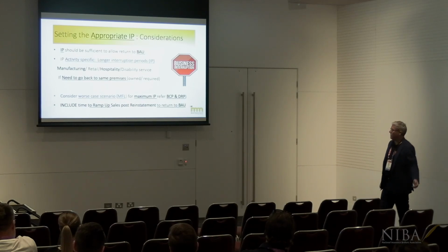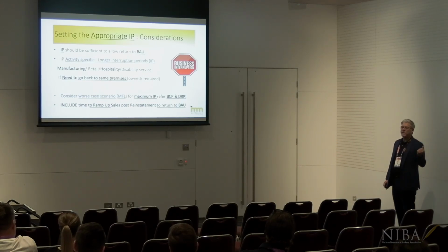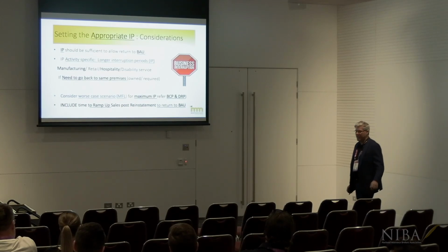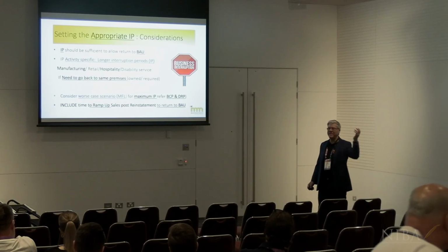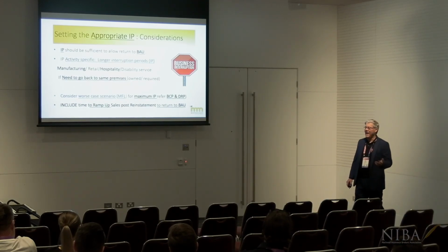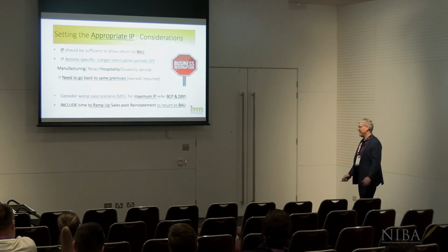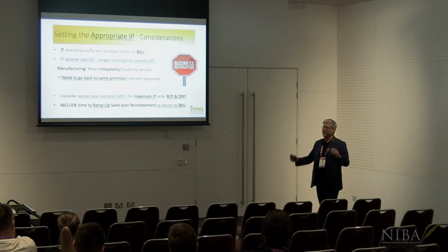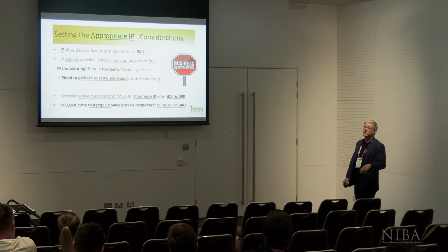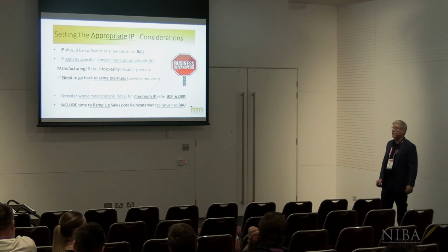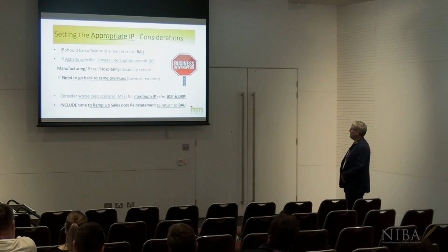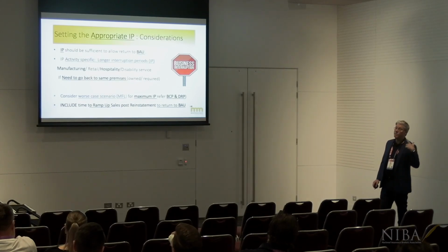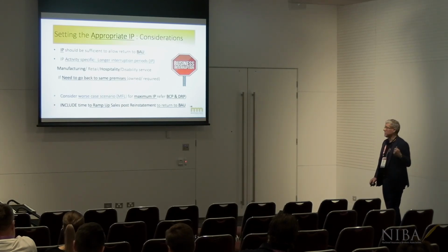And basically what we've found is post-COVID, everything takes longer. So we have examples. We do work for Lion breweries and wineries. And so we actually did the flood claim in 2011 and then the flood claim again in 2022. So you get a real exact comparative of how long it took to get equipment, how long it took to get machines post-COVID compared to prior to. And in our experience, and we get basically this feedback across all the industries that we deal with, it takes longer to get major equipment in than it used to. So that's got to be factored in as well.